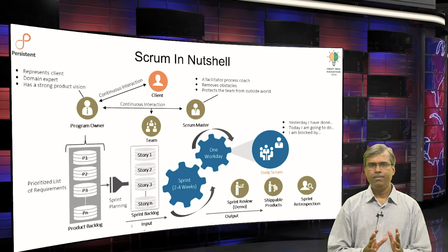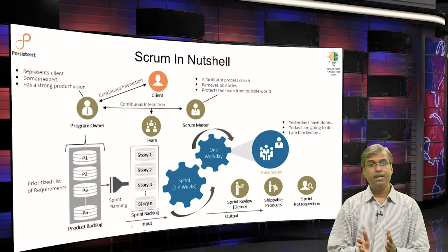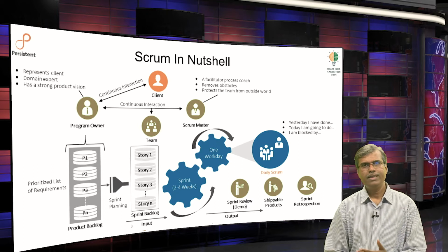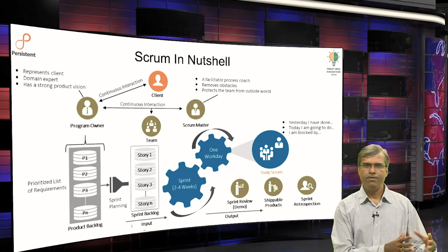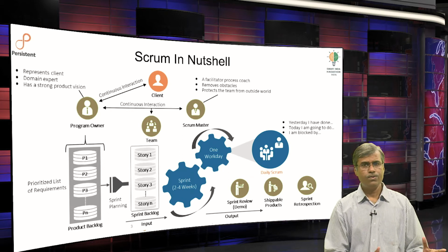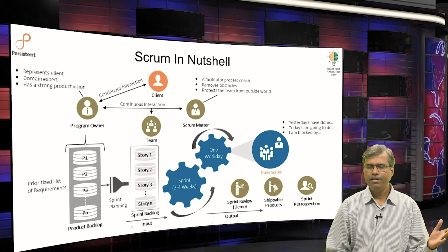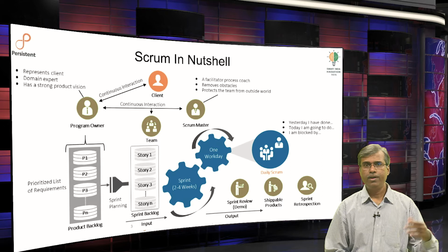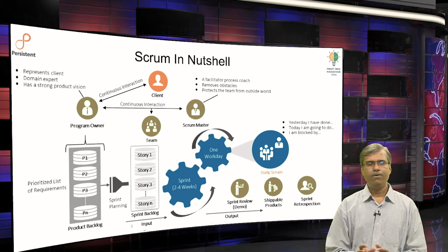And there is another set of backlog which the team uses, a sprint backlog, and the sprint backlog actually contains the stories, right. So, the requirements are part of your backlog, and there are at least two kinds of backlog. One is a product backlog, where you have epics, which are nothing but complex or more significant requirements. At the team level, you have small chunks of requirements which are simplified in the form of user stories, and that is a sprint backlog.